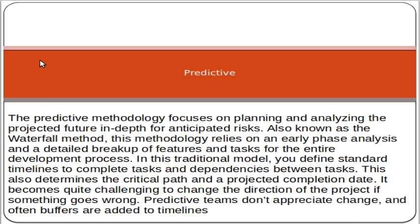Another drawback of the predictive approach is that customer feedback is received at a very late stage of the project — specifically during the user acceptance testing phase. If anything goes wrong at that point, it becomes a very big issue because you cannot go back to a previous stage.